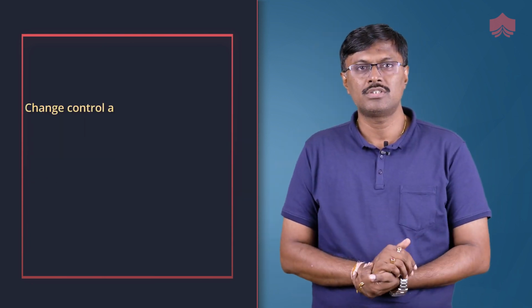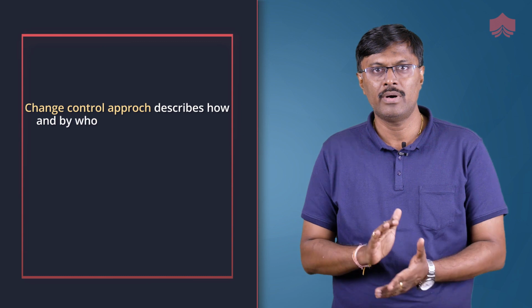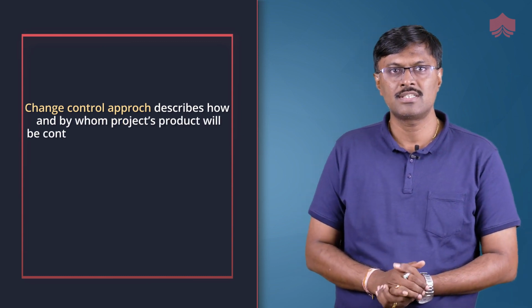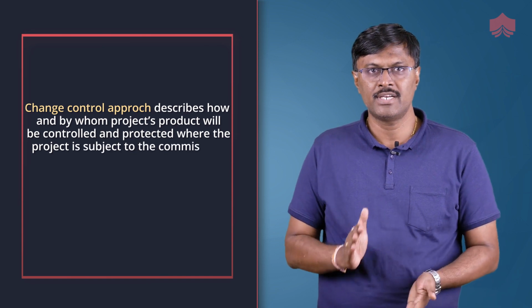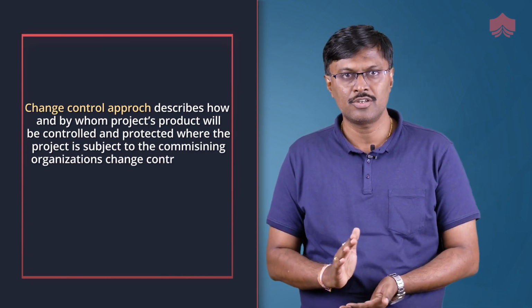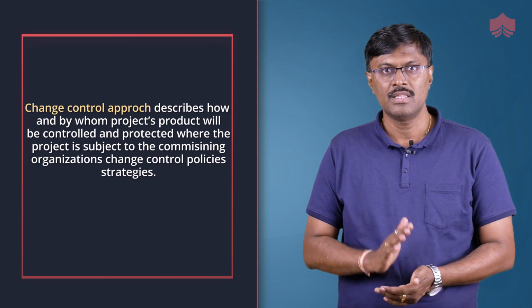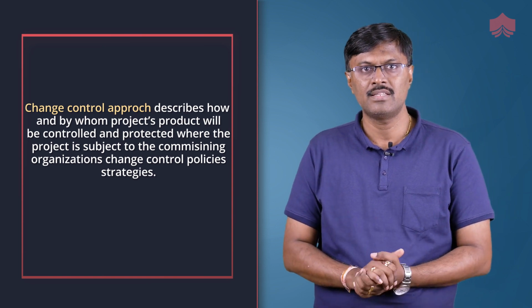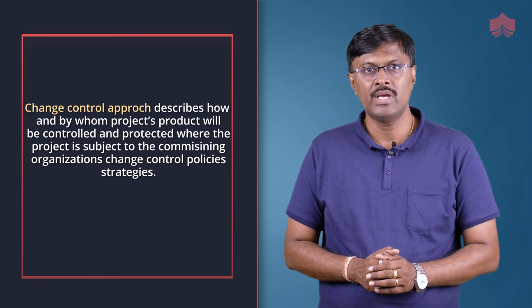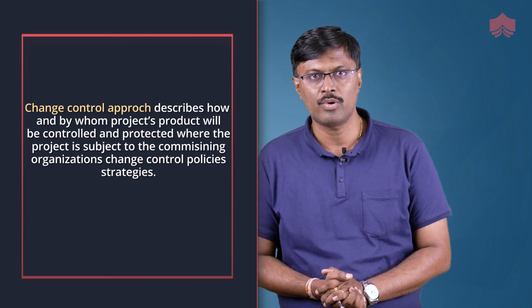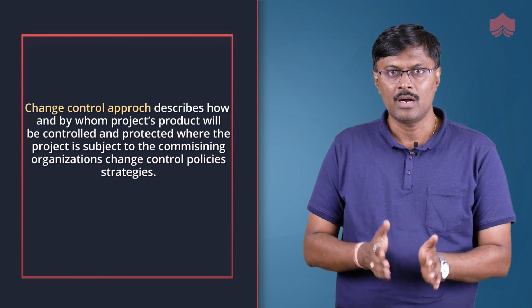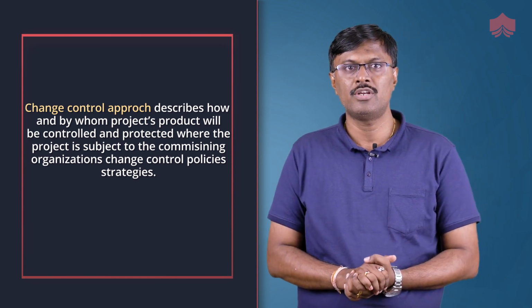Change control approach describes how and by whom the project's products will be controlled and protected. Where the project is subject to the commissioning organization's change control policies, strategies, the PID should make reference to them rather than duplicating them. Where the project is not subject to the commissioning organization's change control policies or strategies, appropriate strategies and approaches should be documented.